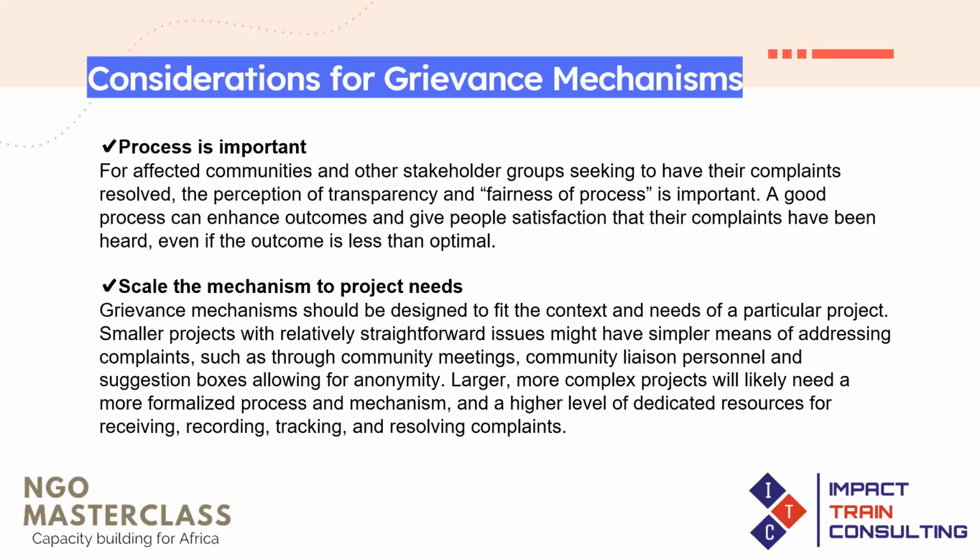Some large projects may require some very formal process of lodging complaints, but for small projects within a community, you may say, okay, we'll have a community meeting whereby community members will be allowed to share their grievances, or we may have a community liaison officer who will be collecting complaints from community members and sharing them with us, or we are going to be providing suggestion boxes at strategic locations for community members to share their grievances.